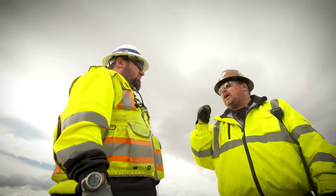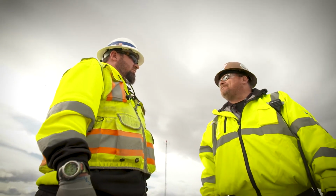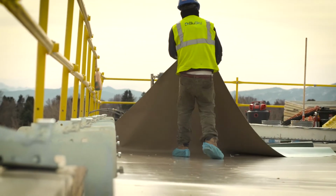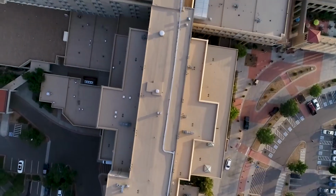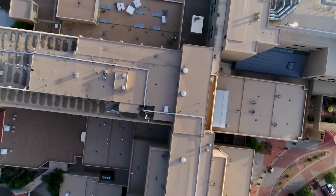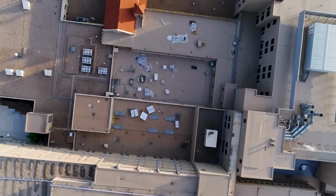Safety is number one around here. First for the patients, our associates, and for the visitors. But then we also hold the individual contractors responsible for following OSHA guidelines. And that put in another significant challenge to this project, putting guardrails all around the roofs. A normal low-slope roof is a football field size, and you can just kind of blow and go, as we say. But with this project, there's multiple different roof facets. You know, it's only 2,200 squares, but at the end of the day, it's 80 different roof decks.